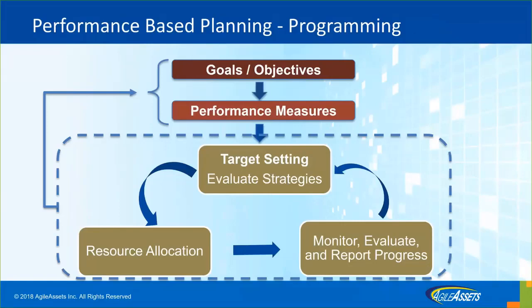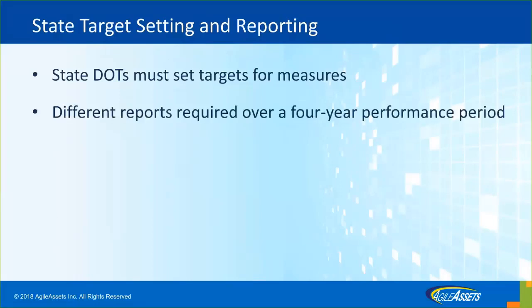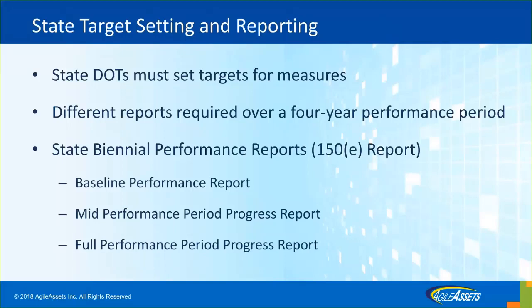States are mandated, at least in the U.S., to follow these rules. There are MAP-21, FAST Act, and federal requirements to monitor, evaluate, and report progress. State Departments of Transportation must set targets for each measure for each program area. In the context of bridges, each agency needs to submit different reports over a four-year performance period.